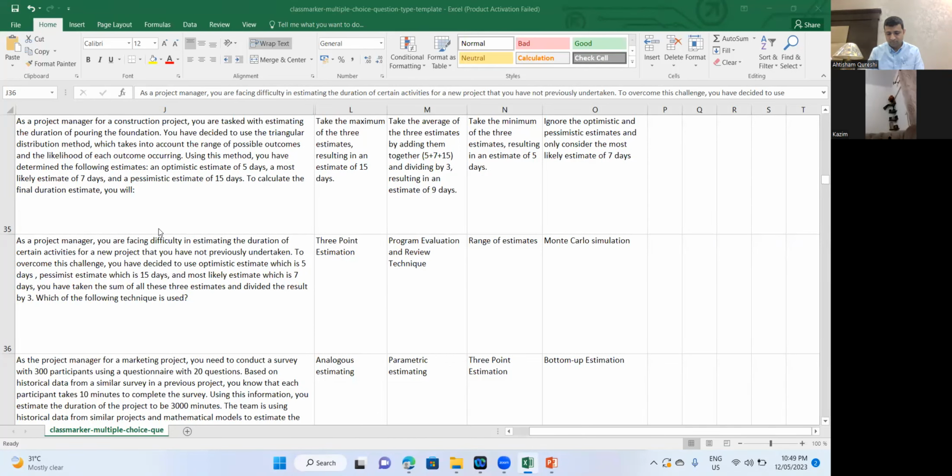To calculate the final duration estimate, it is 5 plus 7 plus 15 divided by 3, right? That's what the estimation is.